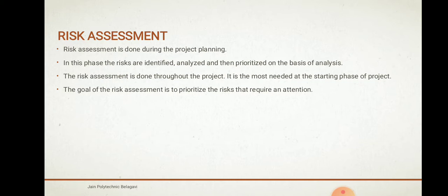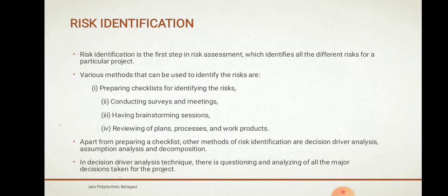The first step is risk identification. Various methods can be used to identify risk: preparing a checklist, conducting surveys and meetings, having brainstorming sessions, and reviewing plans, processes, and products. Apart from preparing checklists, there are other methods for identifying risk.